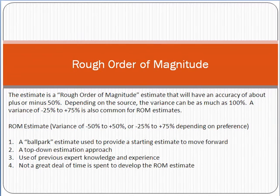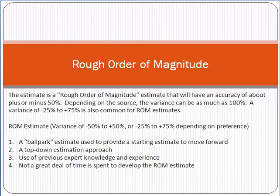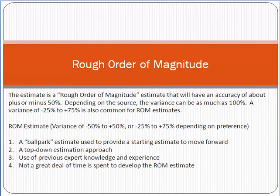The variance range can be minus fifty to plus fifty percent, or alternatively minus twenty-five to plus seventy-five percent. Just remember that Rough Order of Magnitude is not a very accurate way to estimate things; however, it gives the management enough of an idea to take a decision about the project. It is a ballpark estimate used to provide a starting point to move forward.